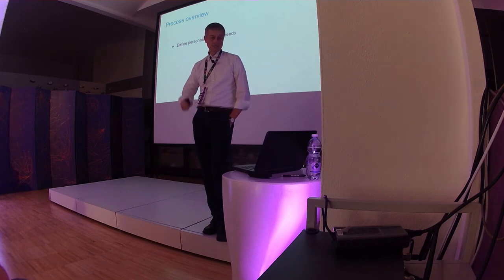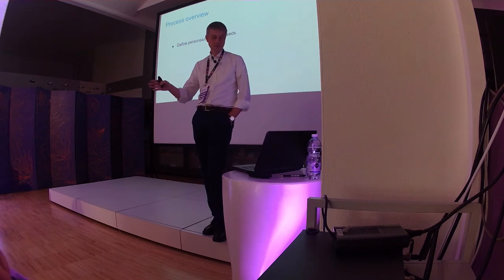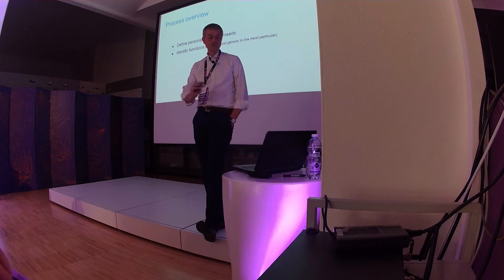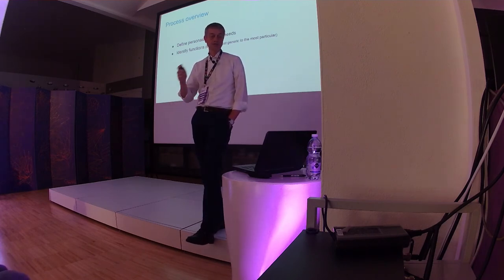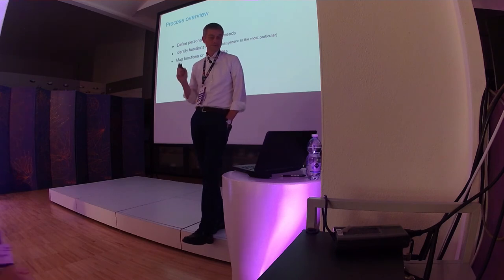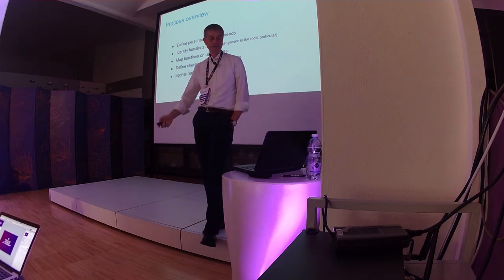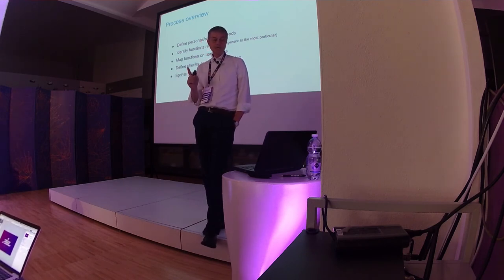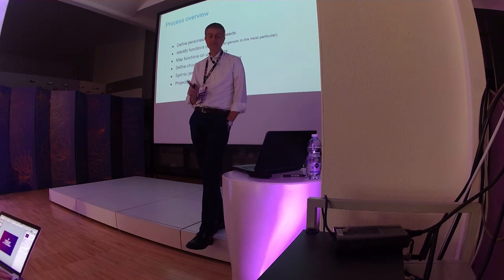Define personas, scenario, needs, user stories through user research, of course. As we said, the team identifies the functions moving forward from the most generic to the most particular, then maps the functions on the user stories. Defines chunks and builds the backlog, that is the main to-do list of the team, starts sprints, and the team does retrospective at the end of each sprint, as well as a final retrospective at the end of each project.